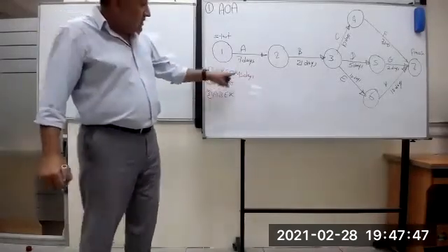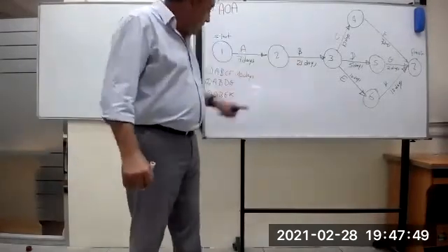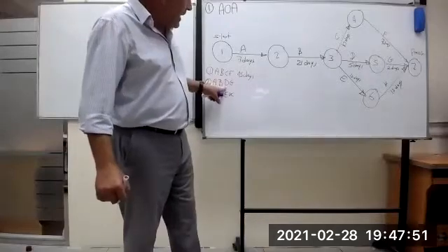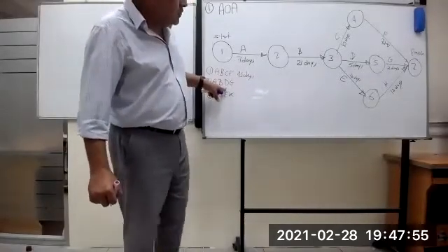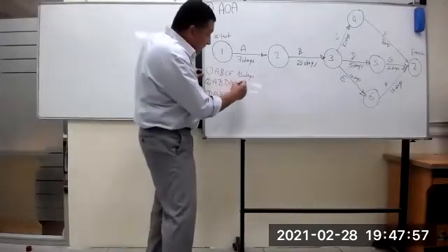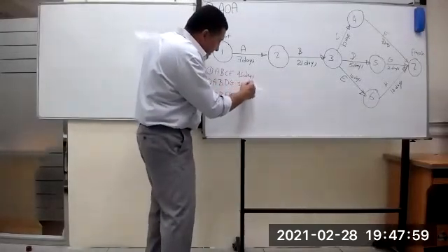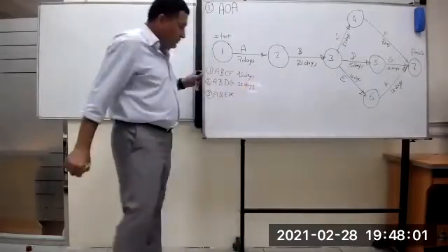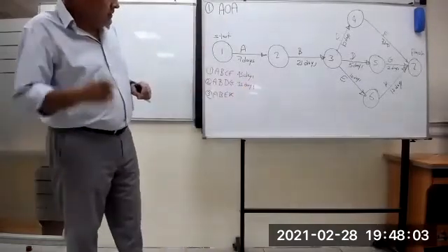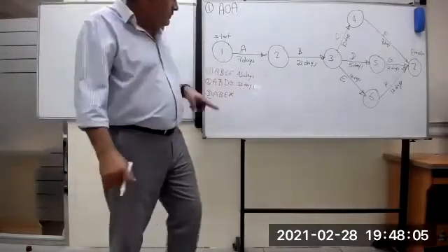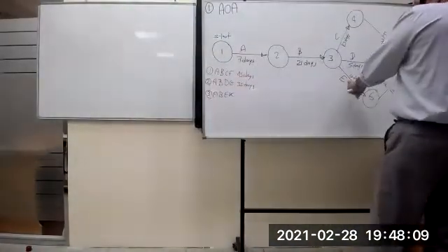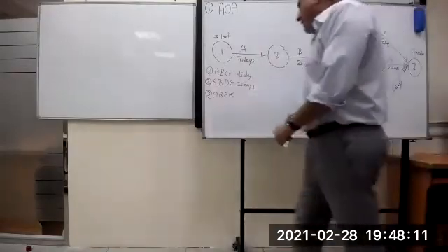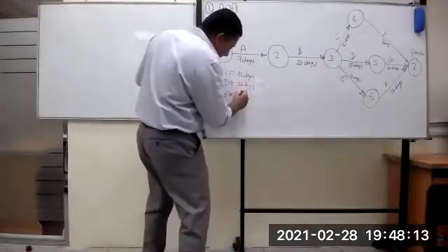A will be at 28 days. 28 days, with D 5 days, 33. 33 plus 2, 35. This is 35 days. And what else? I have 7, 21, and 28, 28, 38, 38. So 50. Very good, 50 days.